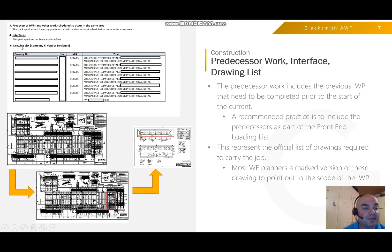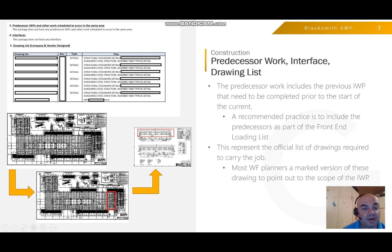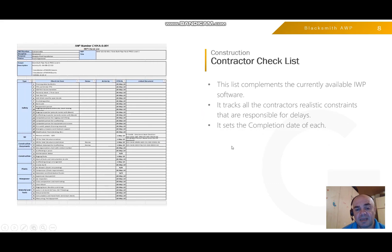You will also need the drawing list. The drawing list available in most tools tells you what the drawing is, but there is an important aspect: highlighting. For instance, this red square shows where the job will start, and another red square shows where to find the detail of a specific item. Putting red-lining on an official drawing is not practical, and if a revision comes on the main drawing you are notified, but the others are not — which is why having proper highlighted or temporarily red-marked drawing links is important.